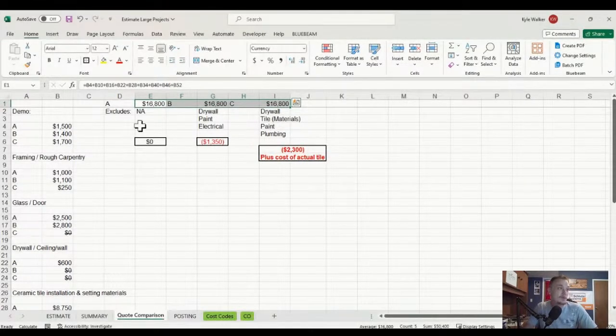But then when you start reading contractor A, the bid I submitted, and again, I'm not always the high guy in this, but I'm making the video, so I get to be the good guy in this scenario. He's got everything. He doesn't exclude anything in the scope of work. You do not owe any more money. You do not have to find any more subs than what is labeled on there. I'm your guy. If you have a problem, you call me, you write one check to me, and I'll write the 7 checks to the subs.